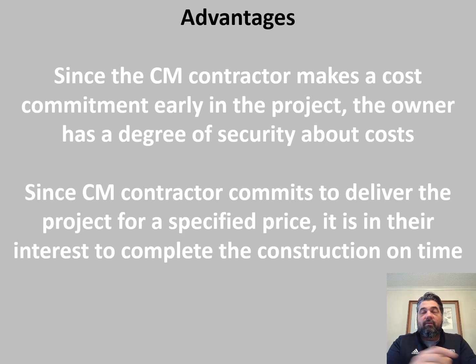Presumably, typically the way this contract is set up for CMC is that there is some sort of fee, usually a fixed fee for pre-construction services that happen, from the time they're hired until the contract is signed with the contractor.